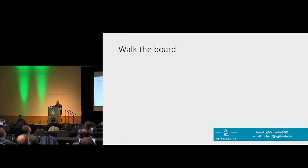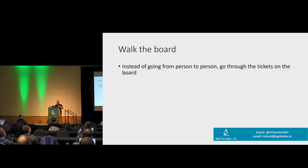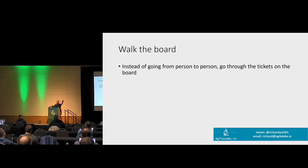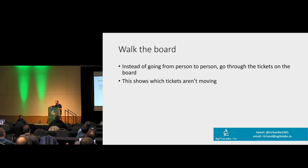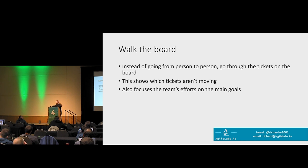Walking the board is another easy hack. Most teams end up having people standing in a circle going one by one, which is very much about the people and can make people feel like they're having to justify themselves. Switch and just make it about the work instead: 'here's our top goal, what happened on that one?' Multiple people might speak to that goal. It changes the dynamic completely at no cost. You can also instantly see if there are tickets not moving — it's much clearer on a ticket-by-ticket basis than person-by-person.